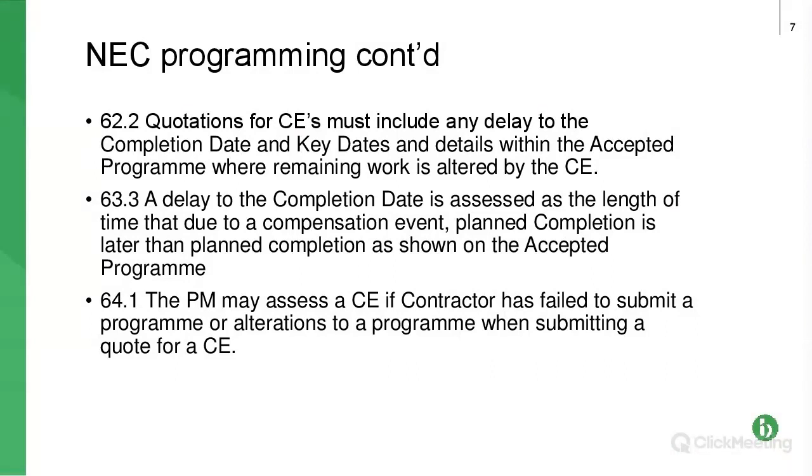So of course that's quite risky, because without a programme it's going to be quite difficult for the project manager to award any time at all. So the contractor is leaving itself open to a zero extension of time award in those circumstances. So please, if you want additional time, if you want an extension of time in relation to a compensation event, make sure you claim that with your quote and submit a programme.